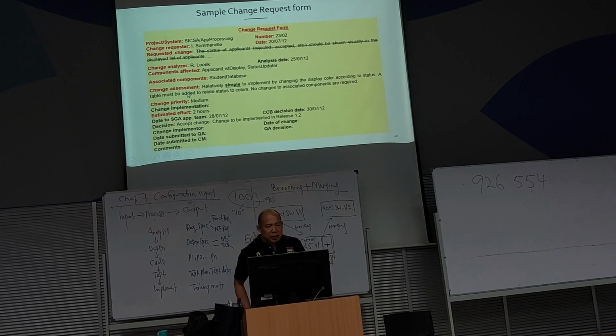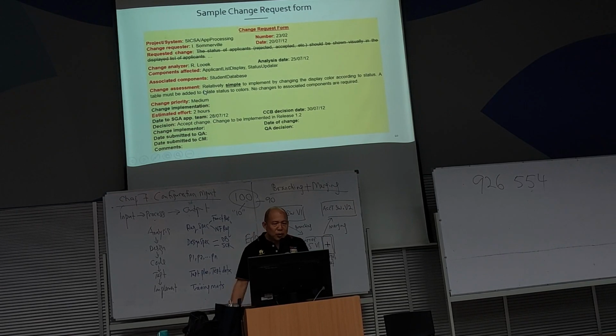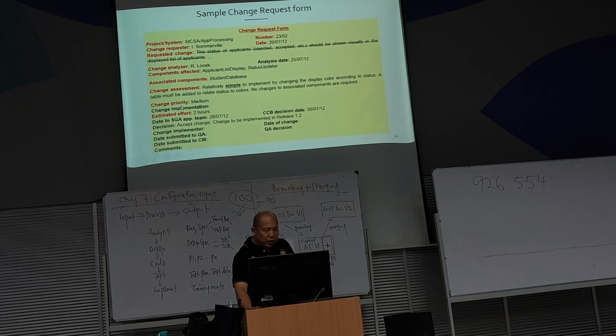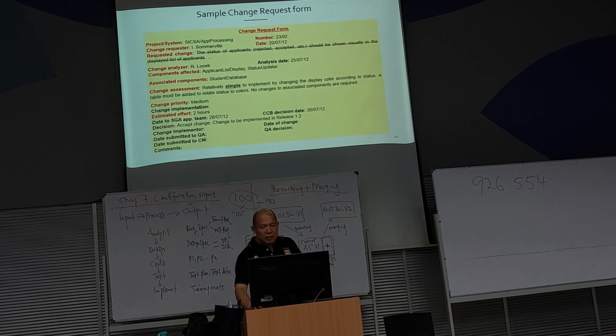Then the change assessment: you write out whether the change is simple or complex, the priority, high, medium, low, and the amount of effort needed, just an estimate.